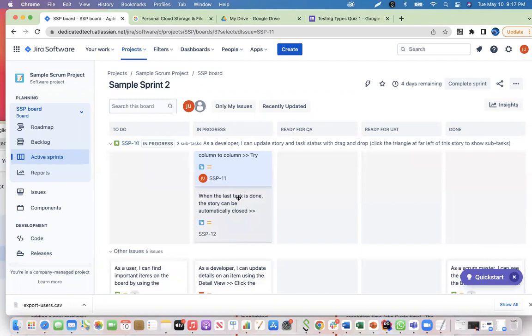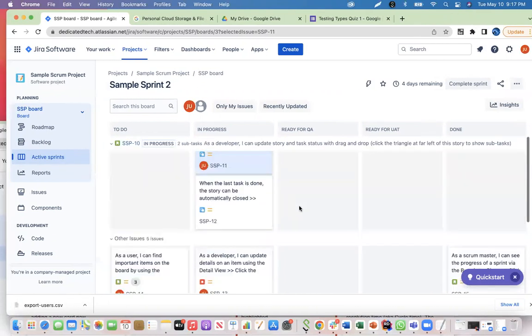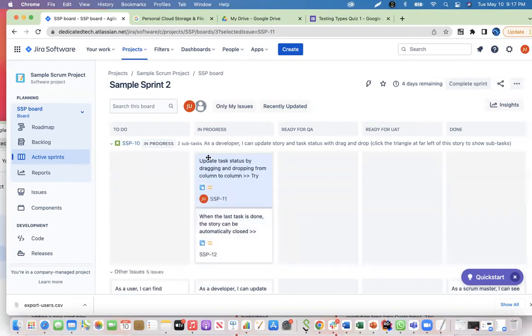So pretty much just understand what will be your workflow here. When you see a story ready for QA, that's when you assign that to yourself and start testing. So it's not going to be your boss, your manager coming in and saying, okay, here is an assignment. You have to go into the active sprint to see what is ready for testing. And then from here, you'll take it, and then you'll move it over to UAT.